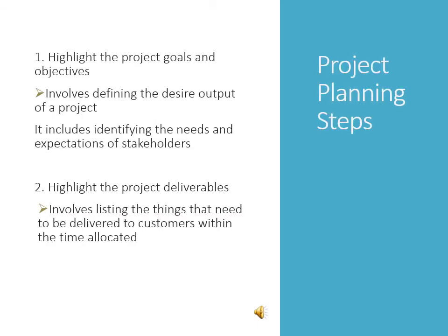The different steps of project planning include: firstly, we need to highlight the project goals and objectives. It involves defining the desired output of a project together with identification of the needs and expectations of stakeholders. Secondly, we need to highlight the project deliverables. This involves listing the things that need to be delivered to customers within the time allocated,